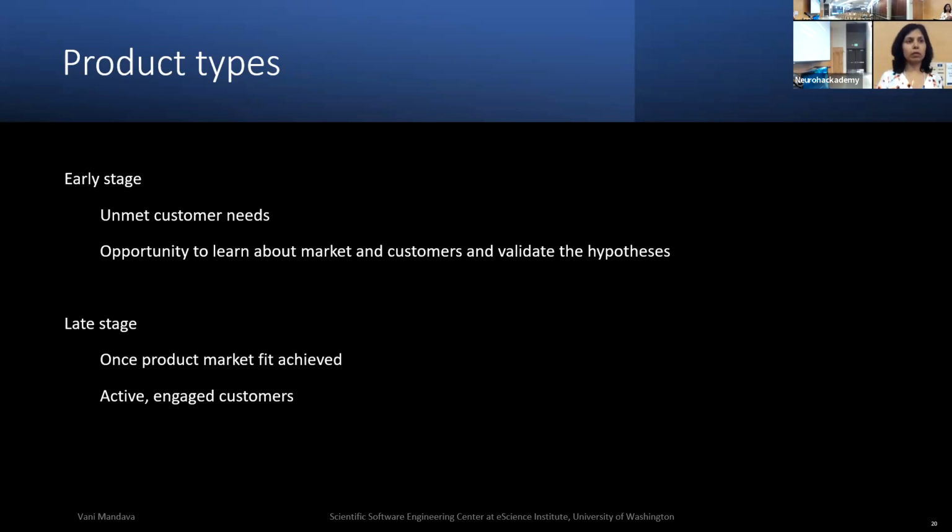There's two things we do. One is identifying the core contributor upfront. The other is to work with them from the very beginning in establishing a community adoption strategy, such that when we exit the project, there has at least been one community adoption event. It could be a workshop, it could be a deployment in a course, in a classroom, in an entire quarter or semester, some kind of setting where we can work alongside them to ensure that the software has been used by a large group of scientists or students or researchers in order to help them set it up for open source.